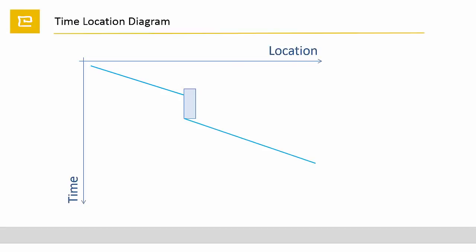You may stop the linear activity and wait till the local construction is finished. You may jump over the local construction and come back later to this area. And finally, you may move the whole equipment and do the rest of the line from the other direction.